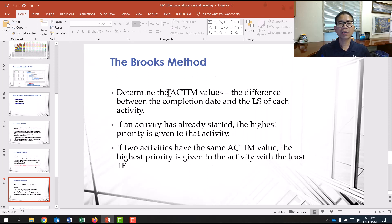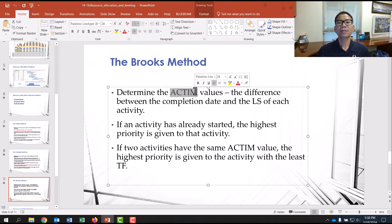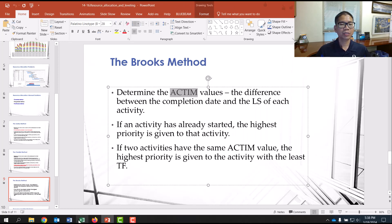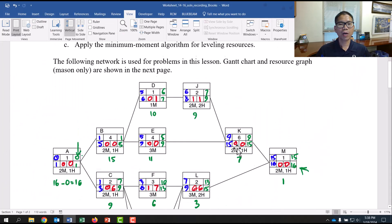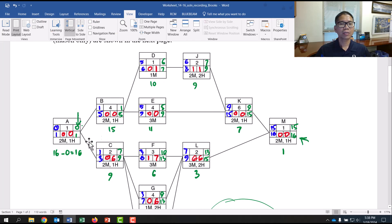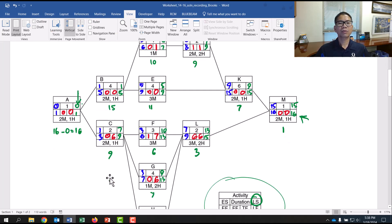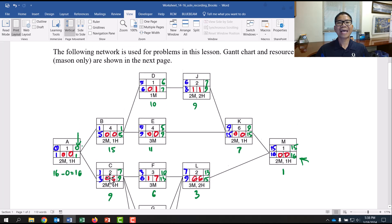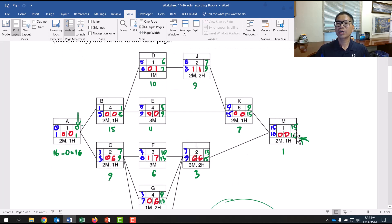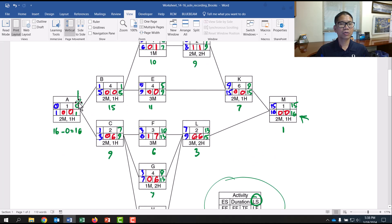The new concept we introduce is 'active': the difference between the completion date and the late start of each activity. The green values here stand for active — the duration of the project, 16 days, minus the late start of each activity. So 16 minus Activity A's late start of 0 equals 16.